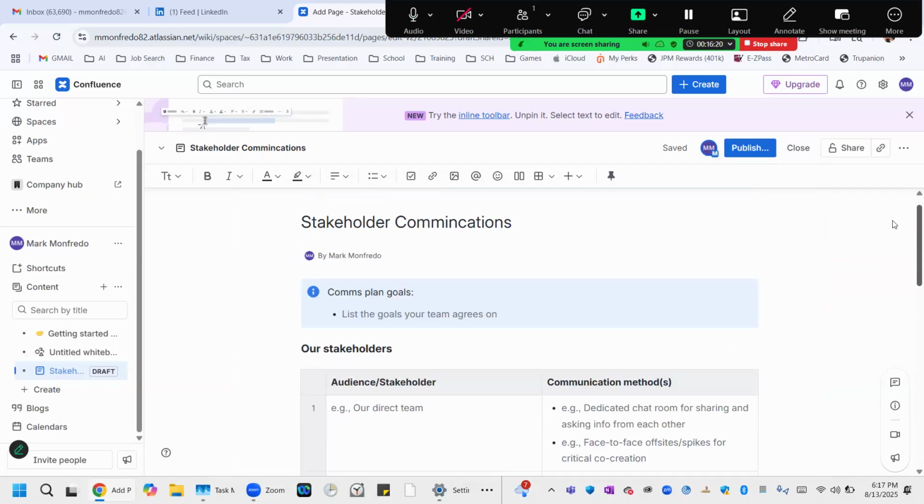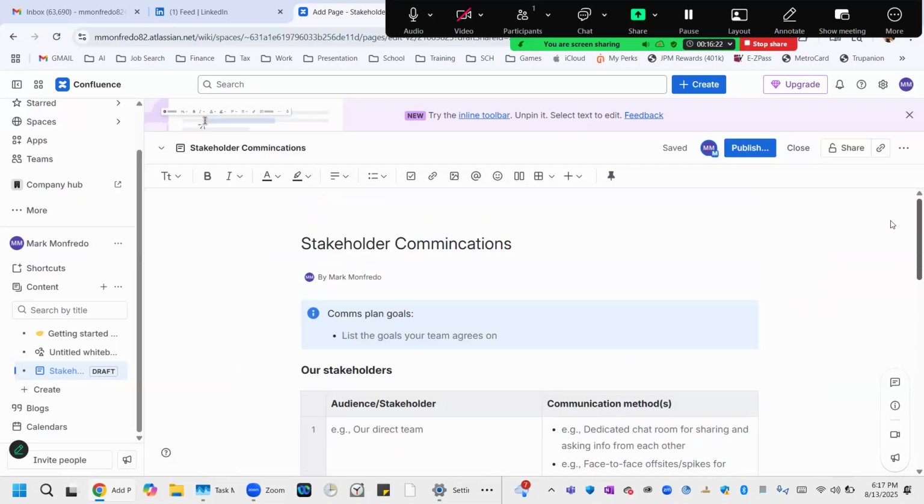Okay, so once again, very quickly taking this from the top, this is the part 2 video for our stakeholders. The first one was on the stakeholder analysis, which contains sensitive information such as influence level that you want to plot out in a matrix so you ensure that those stakeholders that want a high level of influence and a high level of engagement, they are front and center on your radar and you are taking care of them.